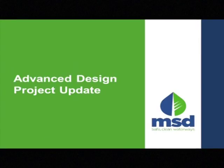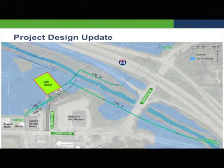All right, so let's talk about the update on this design. We'll go into some details here. Again, I talked about earlier that the basin is located in a floodplain, that it's going to be a covered basin, with grass on top of it. Again, this laydown area for the contractor during construction will be in this area, formerly Jim Porter's. That's not in a flood-prone area.